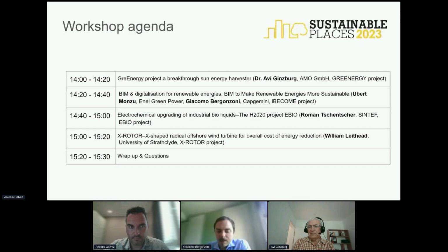and also 5D BIM use, to extract quantities from BIM models and use them as input for the planners, to set up the baseline schedule in the proper way. And also the last one that you mentioned is to do the O&M activities. So we work with asset management. We ask them which equipment they track in their system, which equipment have some maintenance activities.